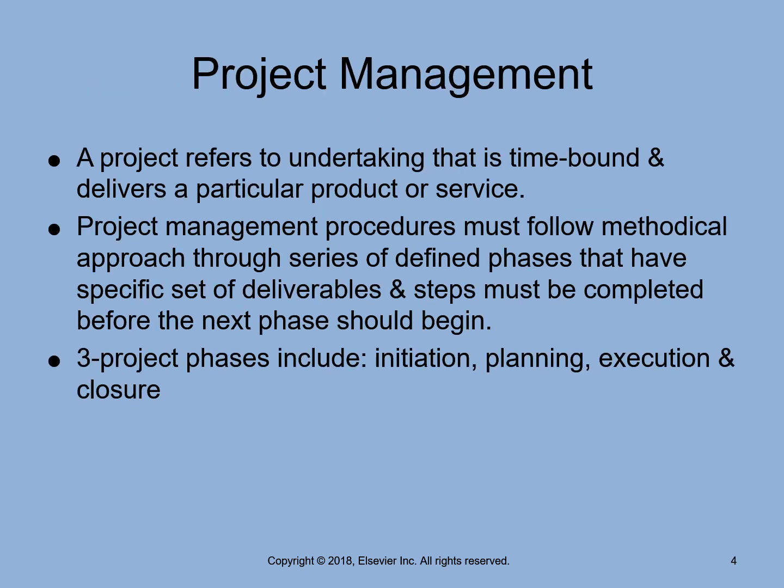A project consists of goals, activities, a timeline, projected risk, and mitigation plans. Each project has an appointed manager that leads the effort. There are 3 phases in a project. First is initiation, the most important activity and often yet the most rushed or undervalued. The initiation phase of a project requires a project manager to gather initial information and resource estimates so that project viability can be assessed. The second phase is planning.